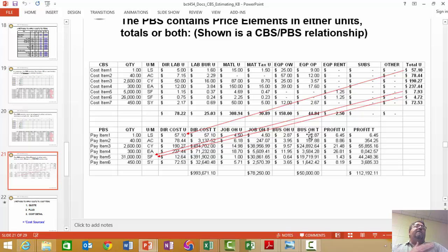So you can have all of the cost categories in job overhead, but typically it's time related. Now, temporary fencing is not time related. If you need to build a small little access road and put gravel on it, that's not time-related, but it's still job overhead, right? It's something that's incidental to the direct cost, right?